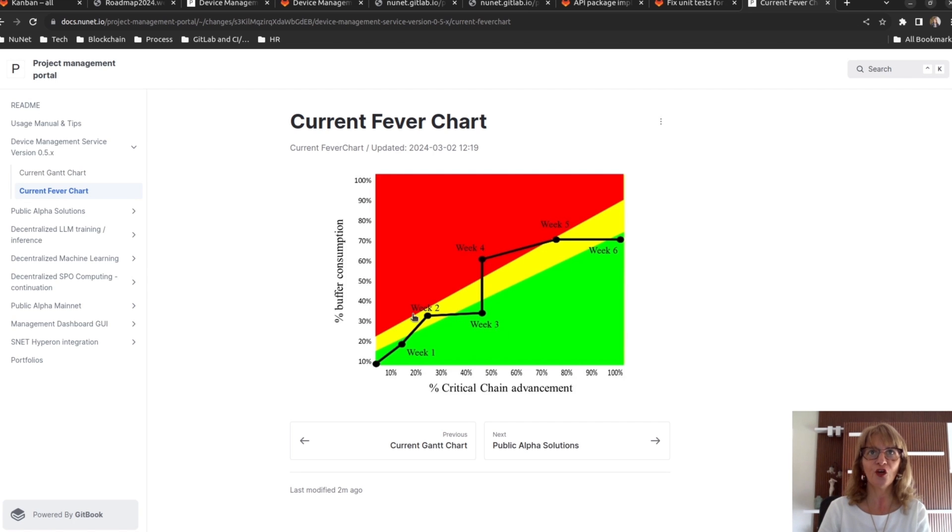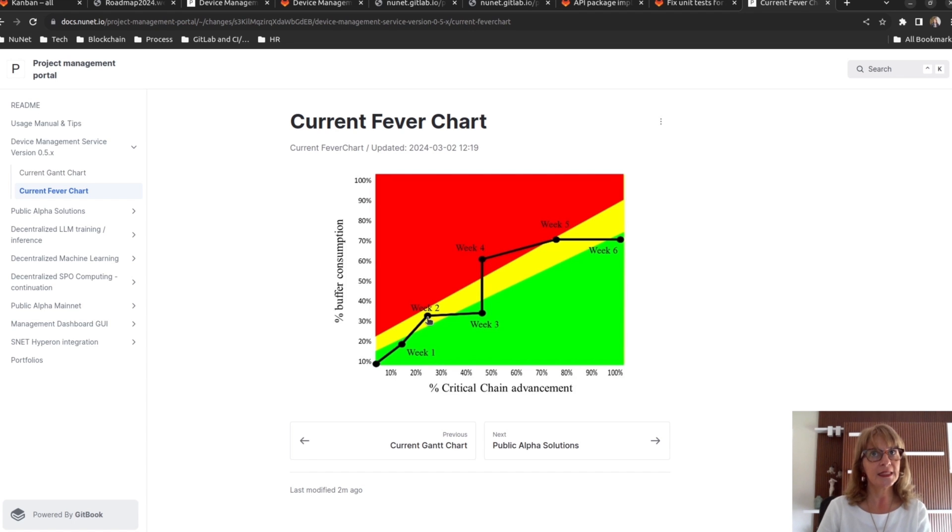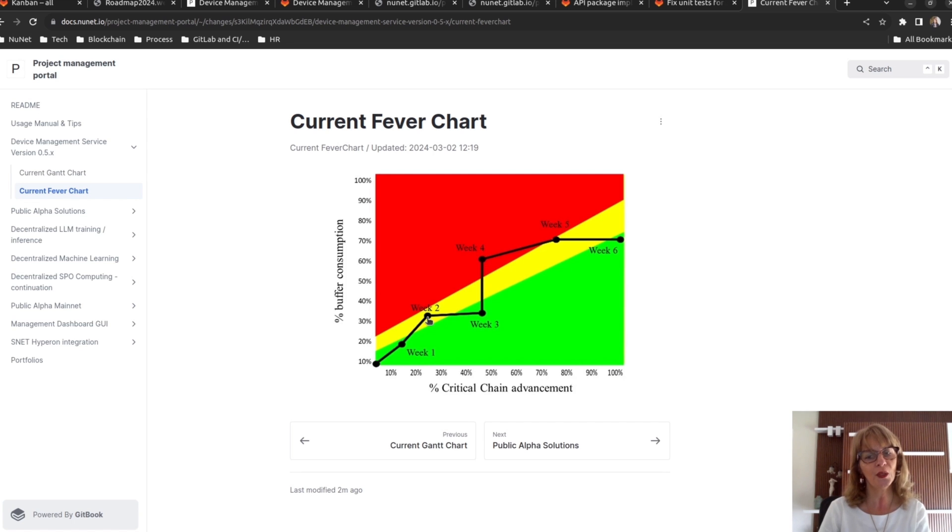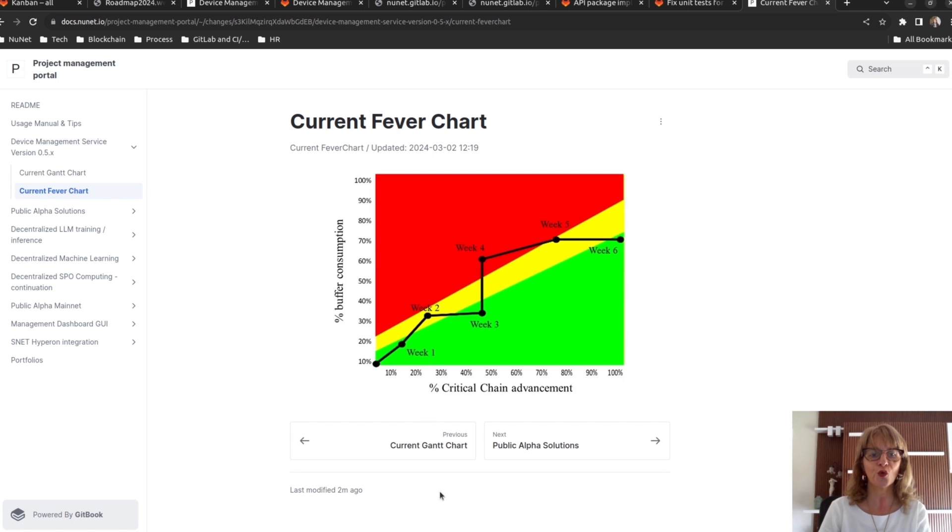At the end of the second week, we see that the project is in the yellow zone. This indicates that the project buffer has been consumed too quickly compared to the task progress. At this point, corrective actions should be considered.